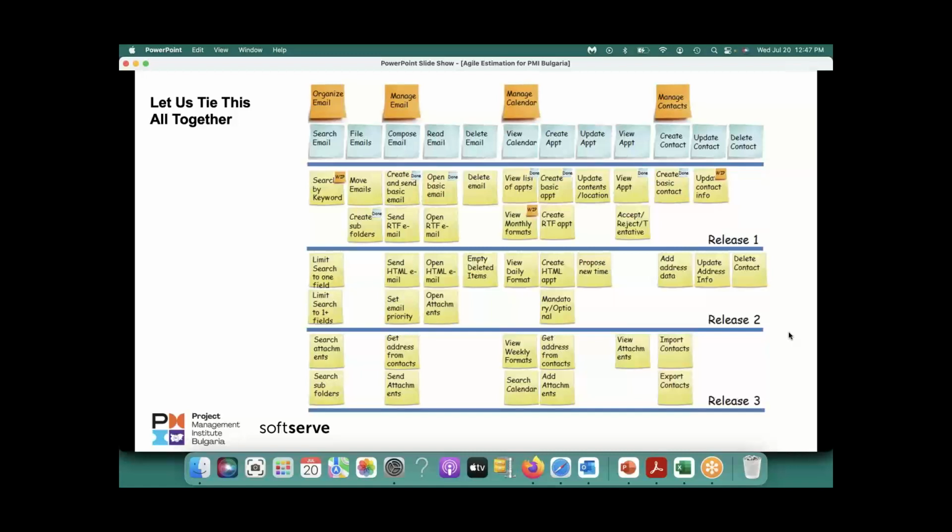Another very good, real thing that I have found to be useful, and you may find it in many places, is that your sprint goal is divided into two parts, a committed goal and a stretch goal. Committed is where every team member commits that no matter what happens, we will do it. And stretch is, if we get to it, we will do it. We will try. If we don't get interrupted from other places, we will do it. But if we get interrupted, we may not be able to do it. So this is a committed goal and a stretch goal.